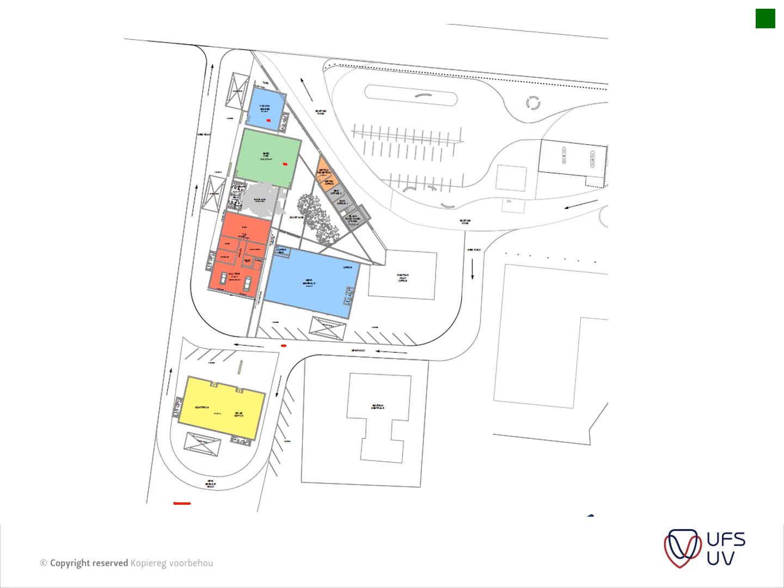So we had a little radio station here which was a bit higher. The rate was also higher because of the square meter. So as your square meter dimensions get smaller, the higher the rate usually becomes, just because of the amount of work that goes into it.